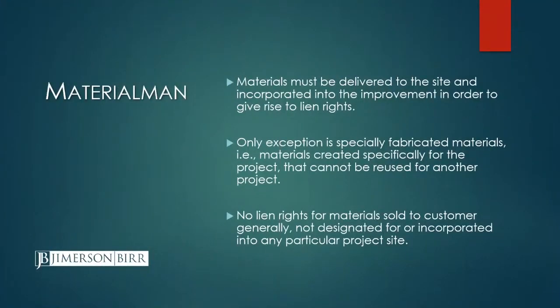One thing to note on the specially fabricated materials: when you actually file your claim of lien, you have to specifically designate, or apportion, the amount that relates to specially fabricated materials that weren't delivered to the project site. There's also no lien rights for materials that are just sold to a customer generally that aren't designated for or incorporated into any particular site.